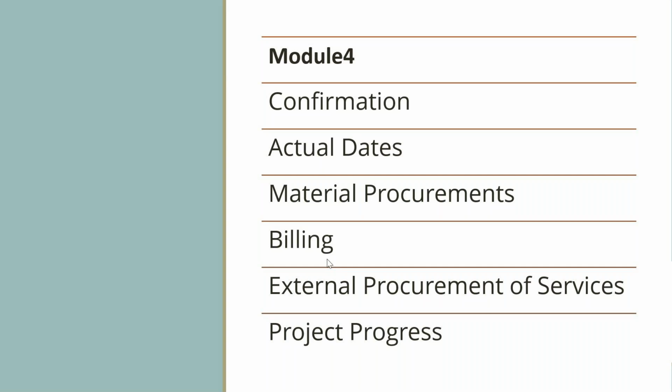You have a WBS, which will be linked to those SD elements, and it can be linked to the quotation and the sales order. Can the same project be linked to other quotations again? Logically, it does not make sense. SAP does not stop it as such, but it does not make sense, because everything is mapped as per the project. The sales order is connected with the quotation, and quotation is the prerequisite of the sales order.